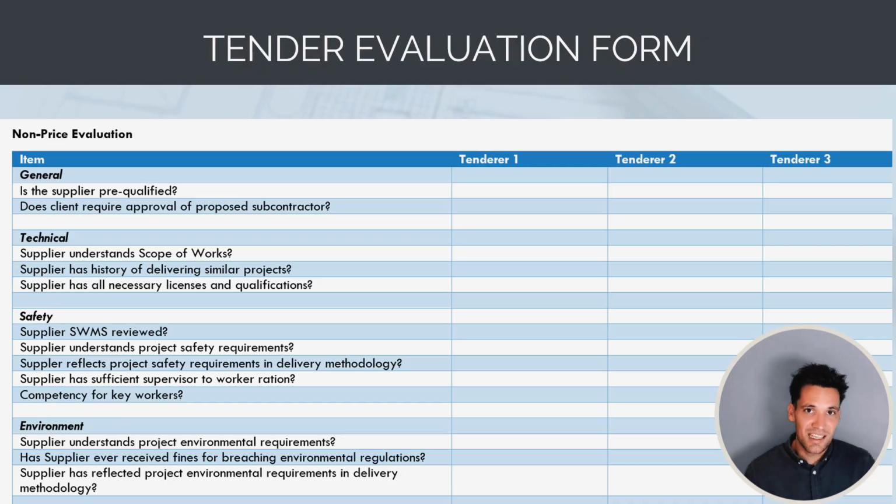We capture this assessment in a tender evaluation form. So for every single one of these factors, technical, safety, cost, we score the subcontractor. So basically, against each of the subcontractors, we get a multi-criteria decision and an overall score to ensure we've got some objective way of assessing the best quote.